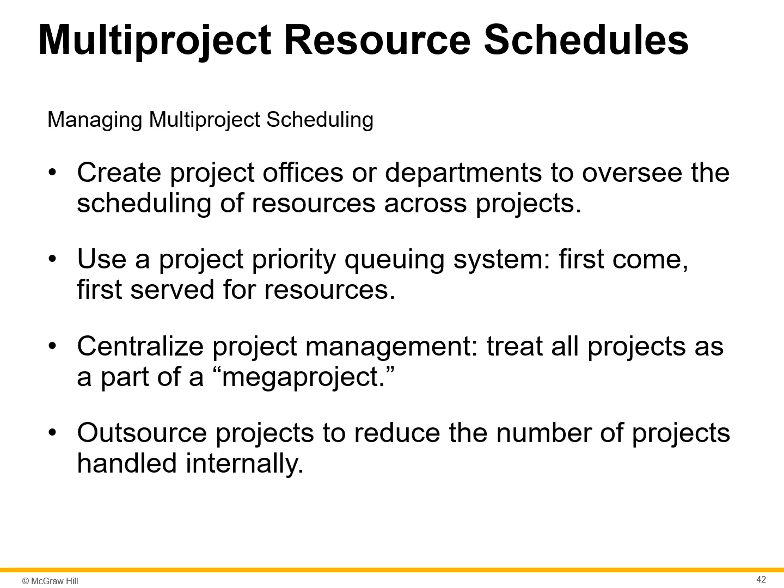A project queue system is created in which projects currently underway take precedence over new projects. Many companies utilize more elaborate processes for scheduling resources to increase the capacity of the organization to initiate projects. Most of these methods approach the problems by treating individual projects as part of one big project and adapting the scheduling heuristics previously introduced to the mega project.